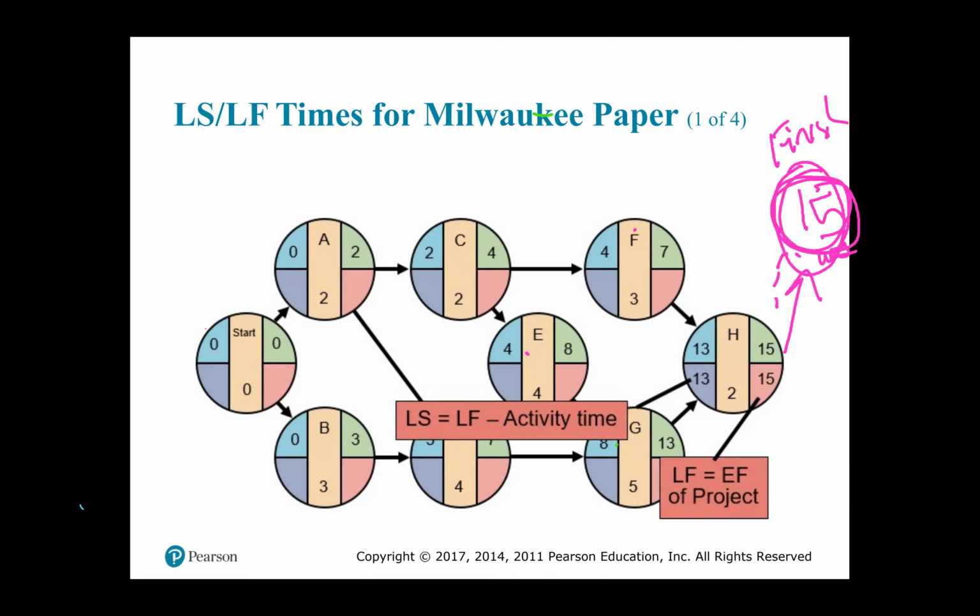You walk backwards, so you're following the arrows, and that's why it's important to put the arrowheads on the arrows so you know where you're going. Because if not, you're going to be wondering, where did this come from again, or who was supposed to have this? So the arrows tell you the precedence relationship, meaning what comes before what and what comes after what.